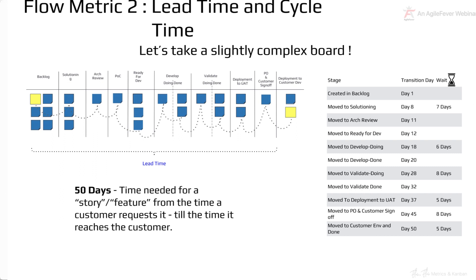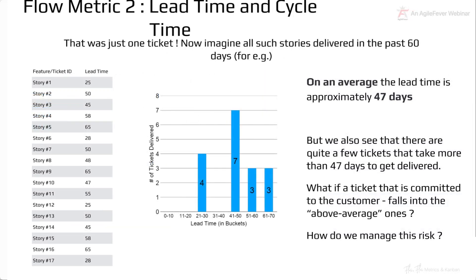On the right-hand side, there's a table showing how long the ticket spent in each phase. The ticket was created on day one, moved to solutioning on day eight — waiting in backlog for about seven days — then moved to architecture review on day 11, ready for dev on day 12, development doing on day 18, spending about six days waiting in ready for development, and so on. It takes about 50 days from the time the customer requested it to when it reaches their hands.